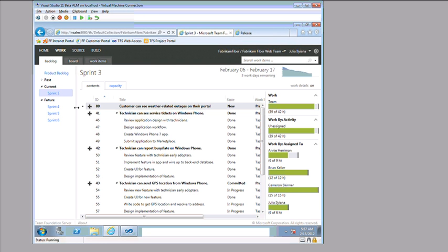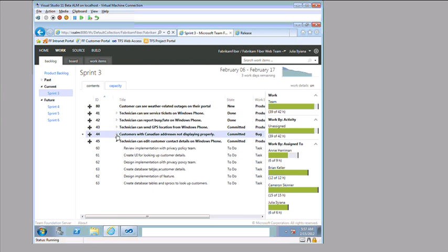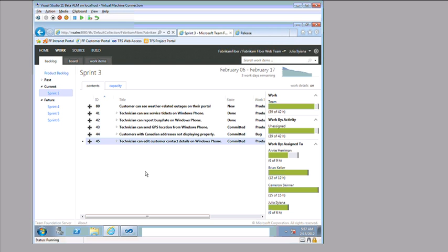As you may know, if you're doing an Agile project, what you're going to be doing is working in short iterations. You've got your overall backlog, which is the values that the customer wants, the stuff the customer desires you to build. Then for each iteration, at or near the beginning, you're going to have some kind of kickoff meeting where you look at the backlog, you confirm that the backlog is in the current priorities that the customer and the product owner have determined, and you say, fine, how many of these things can we pull off the top and do we think we can get done? And we'll pull those into the sprint. We just showed how you can, from the backlog, grab those things and drag them over, and there they are, they're in the sprint. So what you might start out with is something like this.